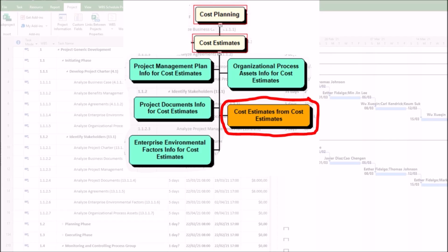A poor cost estimates analysis doesn't just affect budgeting, but it also jeopardizes project viability, stakeholder trust, risk management, and overall success. As a final message, here's how to avoid poor cost estimates. First, use multiple estimation techniques, such as analogous, parametric, bottom-up, and three-point. Second, involve experts and historical data.